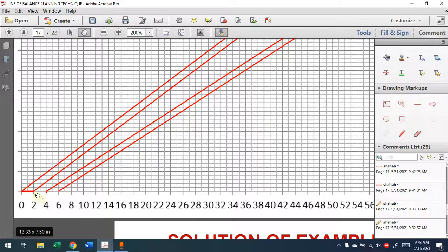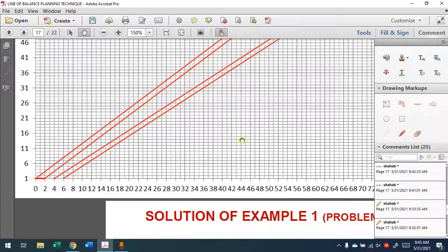Now, do we have the minimum buffer at each? Look, for all the units that we're doing, there should be minimum 2 days between them. Take any unit, from the finish of the first activity to the start of the second activity, there is minimum 2 days available. So this is okay. We'll go for the third one. In this manner, we'll continue.